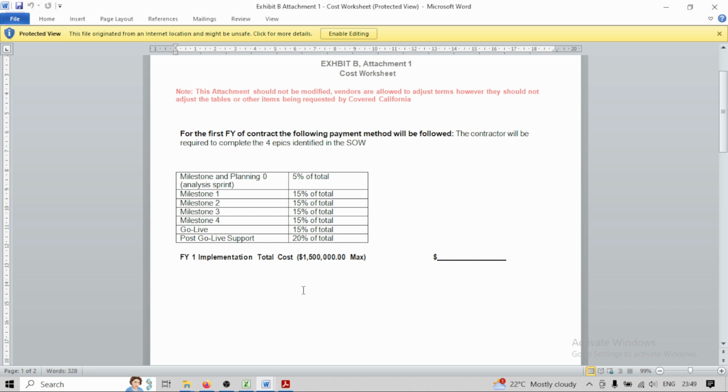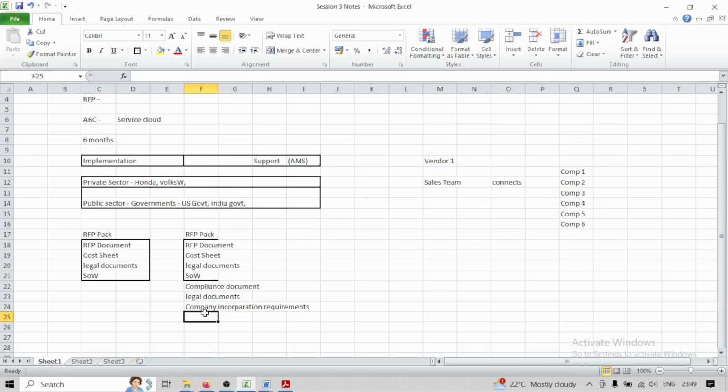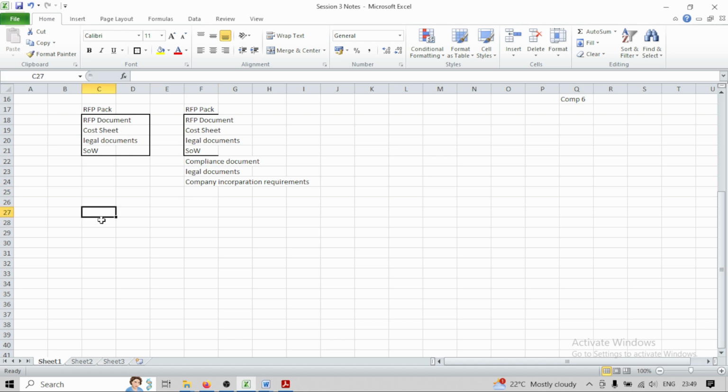Once we are into a project, there is no one-shot cost that is paid by any company ever. Let me just focus on what I'm trying to tell. Let's say we agree with a company that I will do everything in 500K. No company is going to give me 500K upfront, or hold my 500K till the go-live phase.